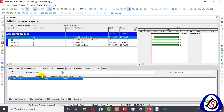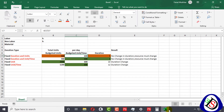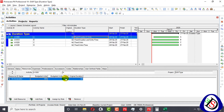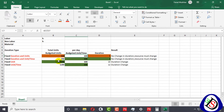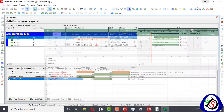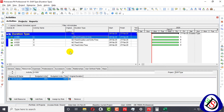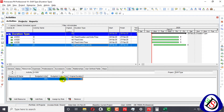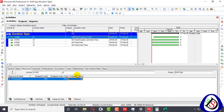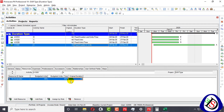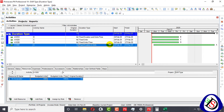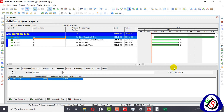The excavator is the resource. The key columns are budgeted units, budgeted units per time, and original duration. As I explained, duration and budgeted units are fixed, and budgeted units per time will vary. When I change the original duration — say to 6 or 7 — the budgeted units per time automatically changes. So when I change the duration, units per time adjusts automatically while both the duration and budgeted units remain fixed.